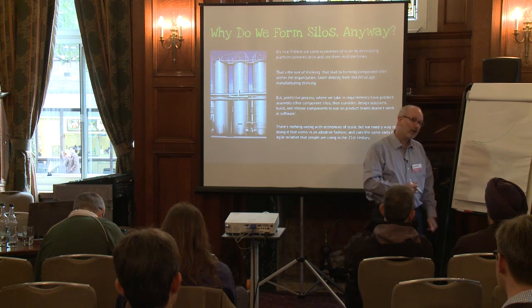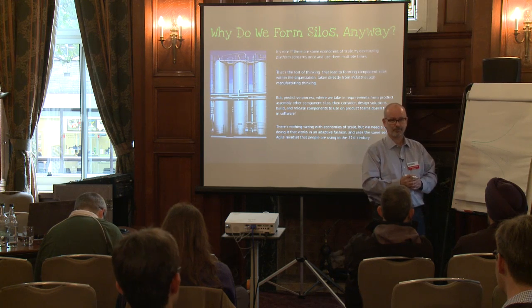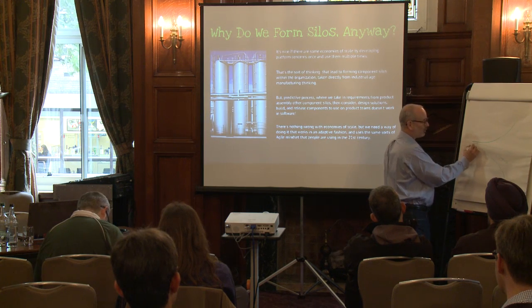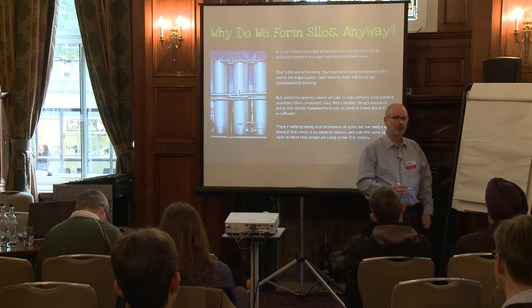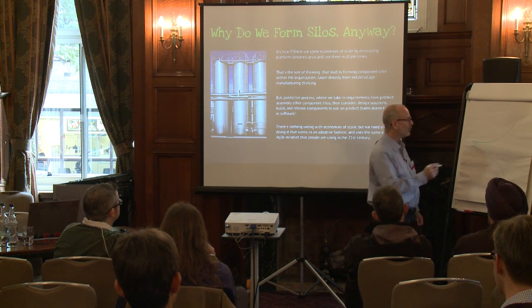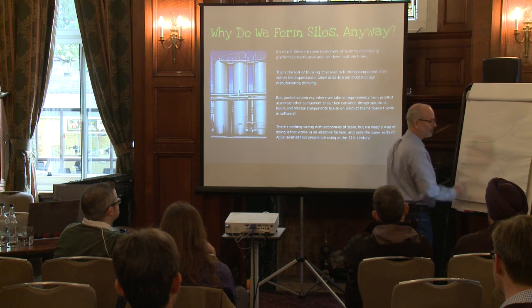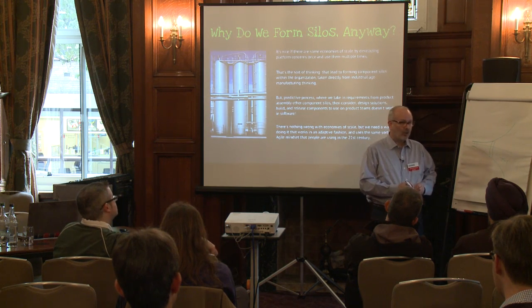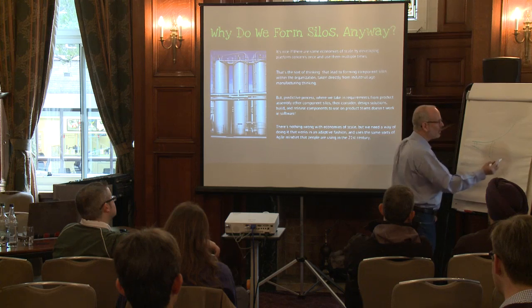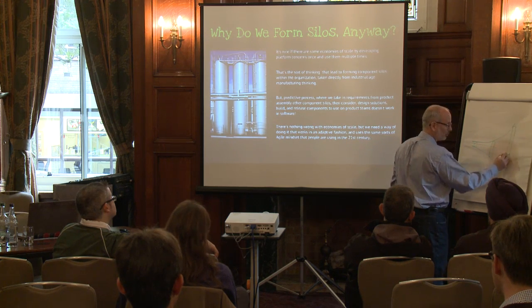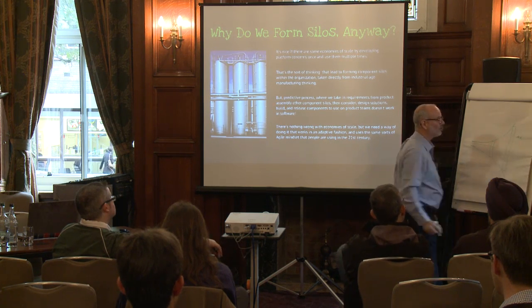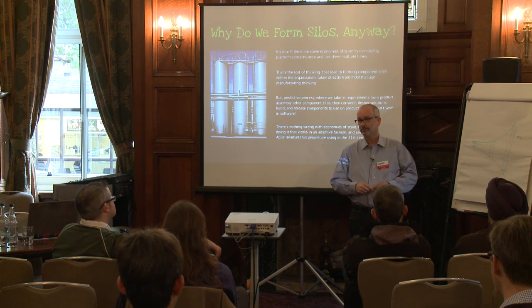program. And they would ask engineers, how long will it take you to do a certain thing? And if that certain thing was like a day, 2 days, a week, their estimates, plus or minus, they're pretty good. You'd ask the engineers, well, how long will it take you to do something if it's, for this other thing? And they said, well, I don't know, it's like a month or 2 months. Okay, their estimates were kind of like that. When they asked engineers, how long will it take you to do something with some complexity, like a lunar excursion module was one of the questions, and they said, how long will it take you to do that? And the estimates, these are from very experienced engineers, were somewhere on the order of off by up to a factor of 4 times, okay, which isn't bad.